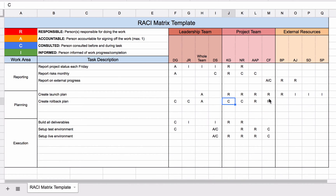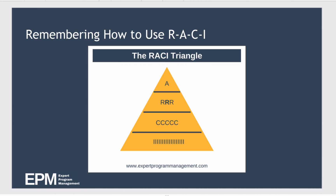One problem with a RACI matrix can be that when you have lots of R's it can be difficult to know who is the one person actually responsible for pulling the other people together so the work gets done. That's where the RACI triangle comes in — it provides a visual way to remember how to use the tool. A tip: you'll notice one of the R's is in bold, and by putting one responsible person in bold you're effectively saying they're responsible for pulling the other team members together and making sure the task gets done.